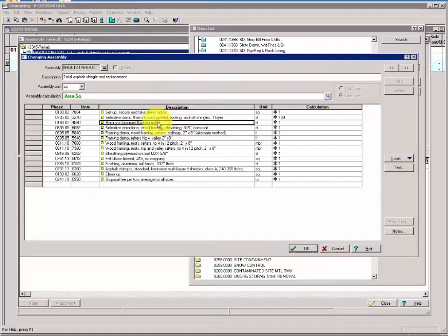We're deciding that of every square, we're going to have 5 square feet of flashing to remove. We'll have 10 square feet, or 10% of the wood sheathing, replaced here. We'll also use 10 lineal feet for the rafters per square and 10 lineal feet of valley. The conversion for 1,000 board feet in terms of replacing it will be 0.016, and for the hip and valley would be 0.013, as one is a 2x8 and a slightly different version in the hip, the 2x8 hip.